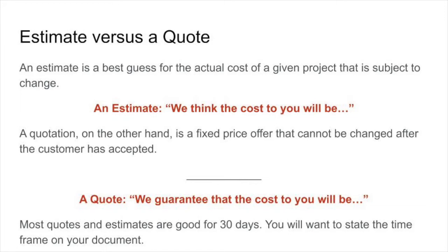From a contractor's point of view, obviously prices can change, and you have to have some freedom to let the quote die, more or less. In other words, the price that you quote is only good for 30 days. So in most contract law, a quote contract will only be for about 30 days. So the point of this whole topic then is, how do we create a reasonable estimate or a reasonable quote? How do we do that for the one-offs?